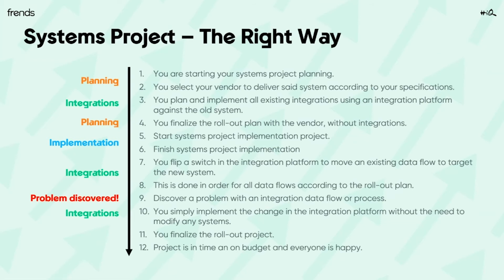So change that existing integration that we've implemented here in the early phases to target that new system, and the work estimate, the effort estimate, to do that sort of target switch, to make the migration from the old to the new, is something like 5% of the effort compared to going about this in an iterative manner.